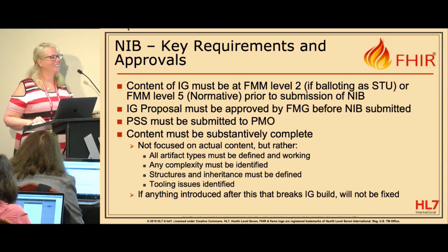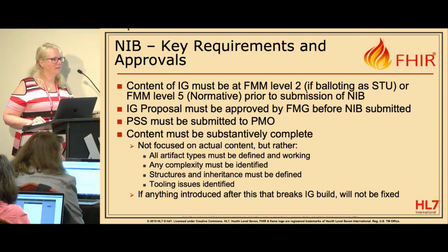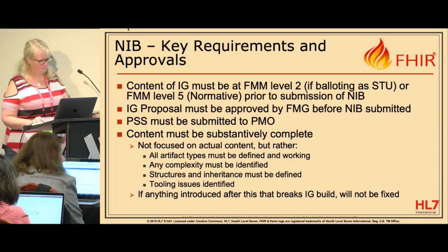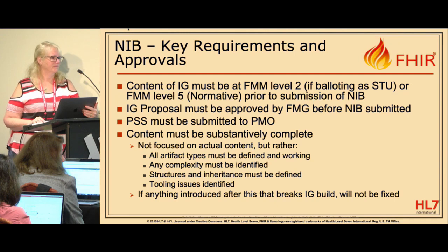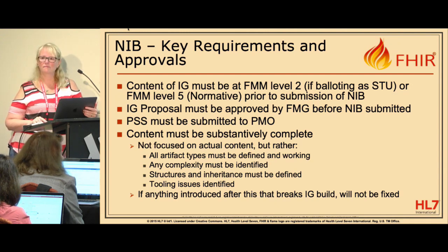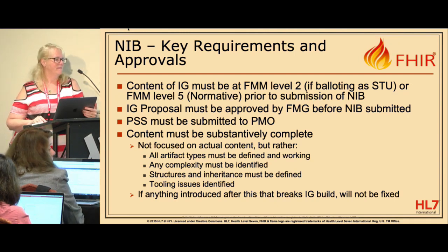Oh, gosh, okay. So, as a project manager, I'm just going to dial this one back a little bit. From a level setting of expectations, it's generally a good idea before you even submit your project scope statement to have had this tested or piloted or connect-a-thon, because timeline-wise, I can submit a project scope statement, and 4 weeks later submit my NIB. Now, you guys have changed this process. So realistically speaking, if I submit a project scope statement and I haven't gone to a connect-a-thon or tested, I may have to sit out a ballot round.